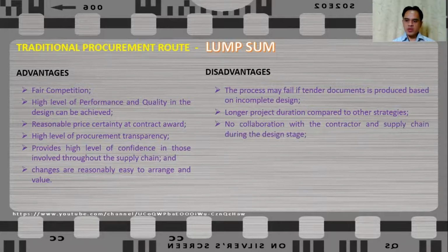No collaboration with the contractor or supplier during the design stage. Collaboration with these entities could sometimes result to best value for money. This may also result in adversarial relationships as the strategy is based upon price competition.